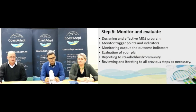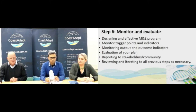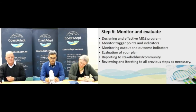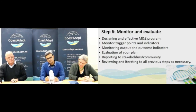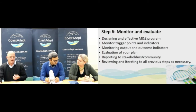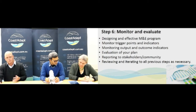The final step is monitoring and evaluation — always looked at as the final step, but often some of the most important. You need to develop an effective program and monitor those trigger points and indicators identified in your plan. We also need to think about not only the outputs — have we implemented something — but the outcomes: what are we achieving over time? We need to use that information to evaluate our plans and report back to our stakeholders and communities. There's a range of tools for evaluation provided within the guidance in CCADs and CoastAdapt.